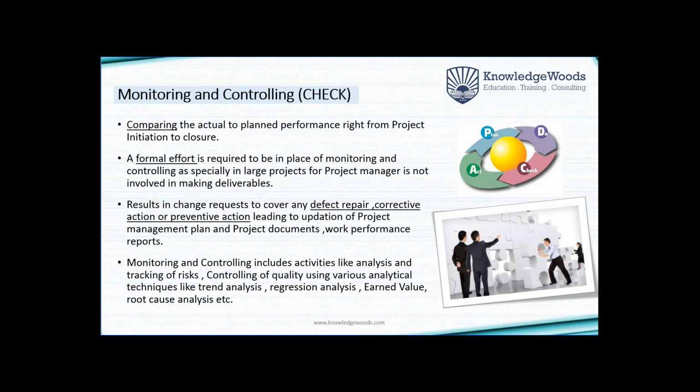And once you monitor it, what will you get? What are you monitoring? You are monitoring the execution and seeing that it is in line with the plan which we had made. If it is in line, yes, absolutely fine. But if it is not in line, you may have to act. Initially, in the early part of the project execution, you may ignore the gaps, but then the time will come when you will have to take certain actions. Now, what are these gaps? For understanding's sake, they are reflected in the form of a variance.